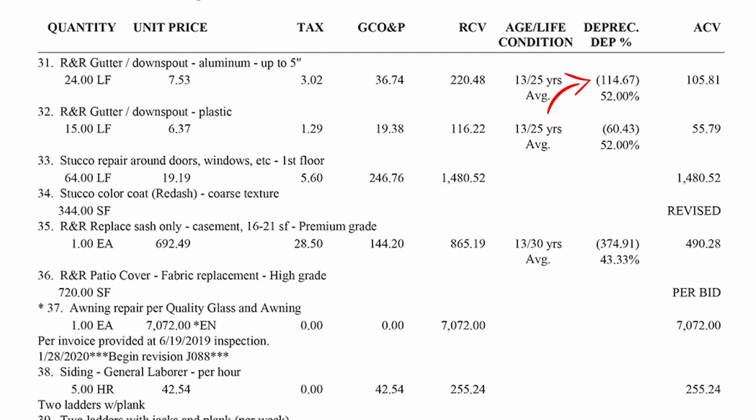So this is what the insurance paid this customer to get the work started. Once we're done with the work and we show them the pictures and what's called a notice of completion, they will release this $114, and we will collect it from the customer once all the work is completed. This depreciation number is very important because a lot of people think it is not recoverable, but it actually is. It's recoverable once we complete the work and send them a notice of completion. Most insurance restoration contractors are aware of this, and they should be able to do this for you.